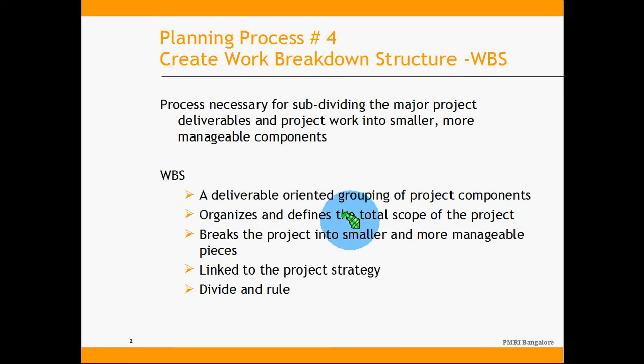There should be a one-to-one mapping between the scope document and the work breakdown structure, otherwise when you deliver the product some of the requirements given by the customer may not be met. The WBS breaks the project into smaller, more manageable pieces — work packages — to be managed individually. This is based on a divide-and-rule strategy.